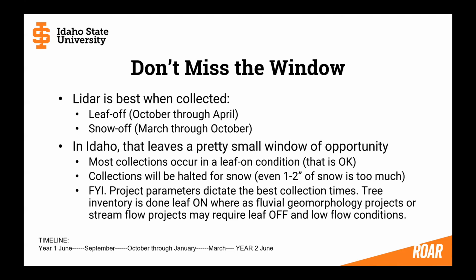For your information, project parameters dictate the best collection times. Tree inventory is best done leaf on, whereas fluvial geomorphology projects or stream flow projects may require leaf off or low flow conditions of those streams. So leaf off in early spring when the water is really, really raging may not be a good window of opportunity, really.